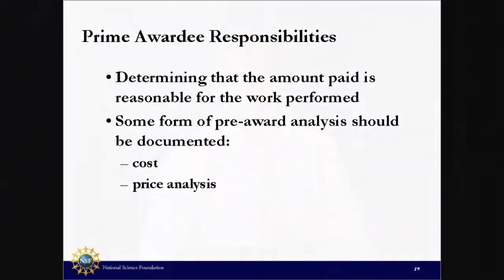And make sure, like I said, that they're in compliance with everything. We've had situations where I found some PIs were debarred and suspended. Make sure you check that. And I'm going to give you a chance to see that. But when you're doing it, make sure that it is cost effective. One subawardee might give you a great presentation, but another subawardee can do the exact same job for the same amount, or if not cheaper. Make sure you are balancing that out. Make sure that you're doing a proper price analysis when you're creating a subaward agreement.